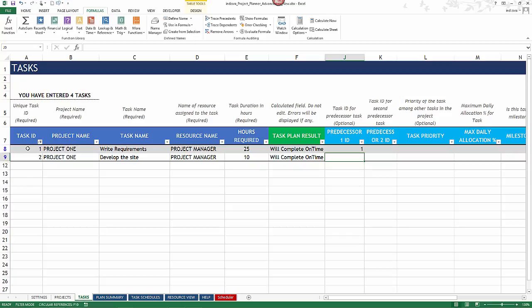In this scenario, task one depends on task one, meaning task one cannot start until task one is complete — which is clearly impossible. It's very important to remove the circular reference. Once resolved, the status bar will no longer show it. A task cannot depend on itself.